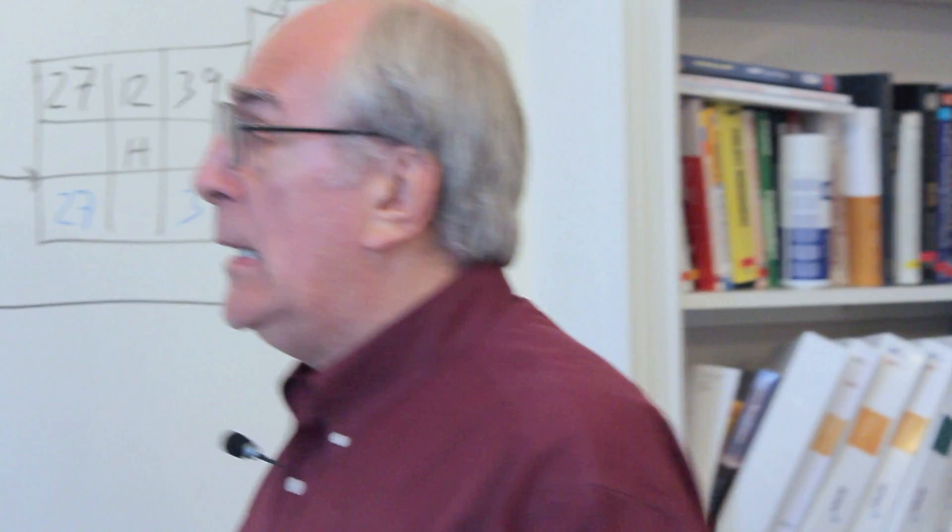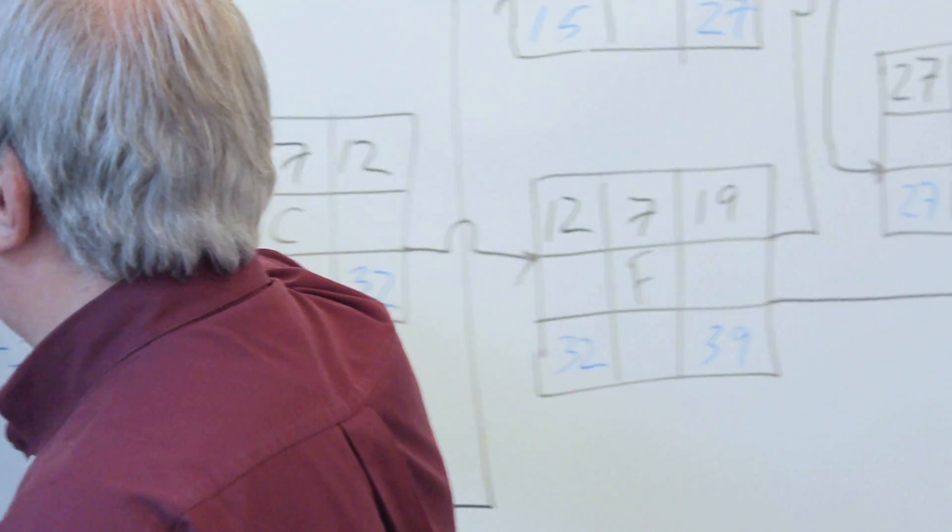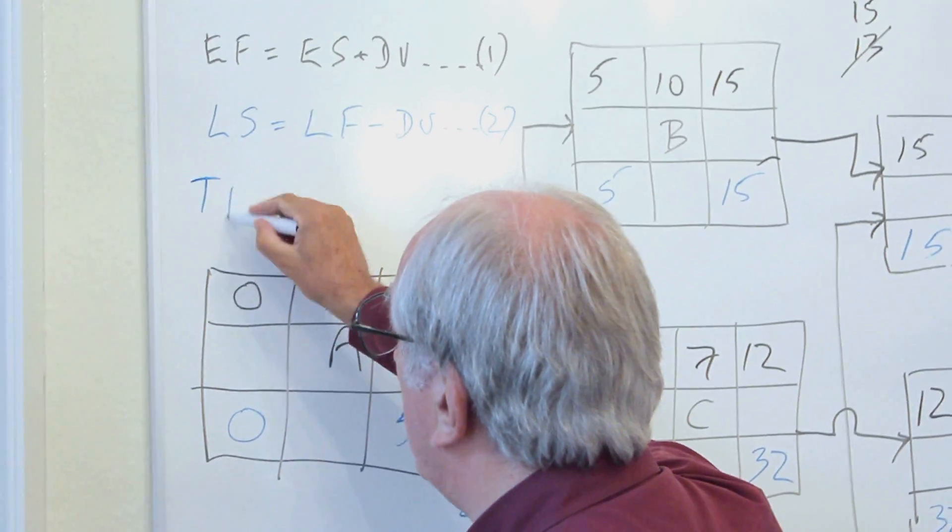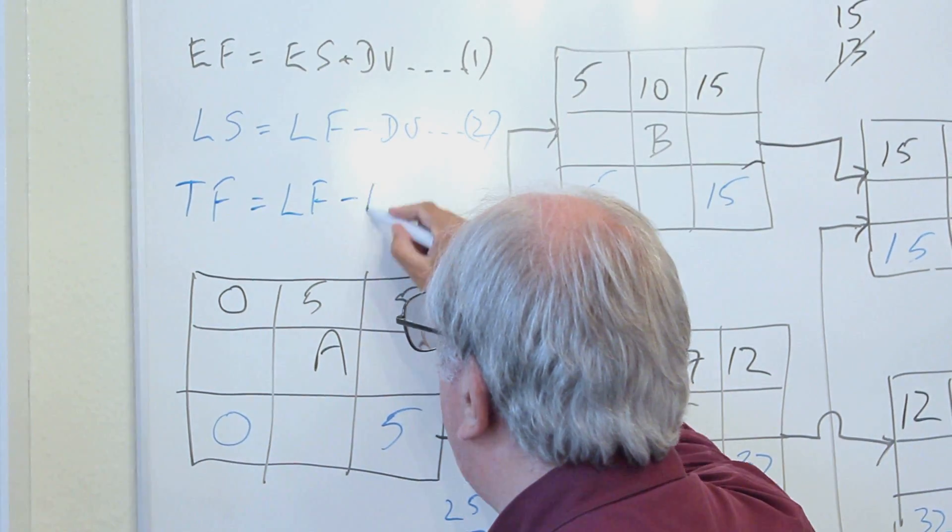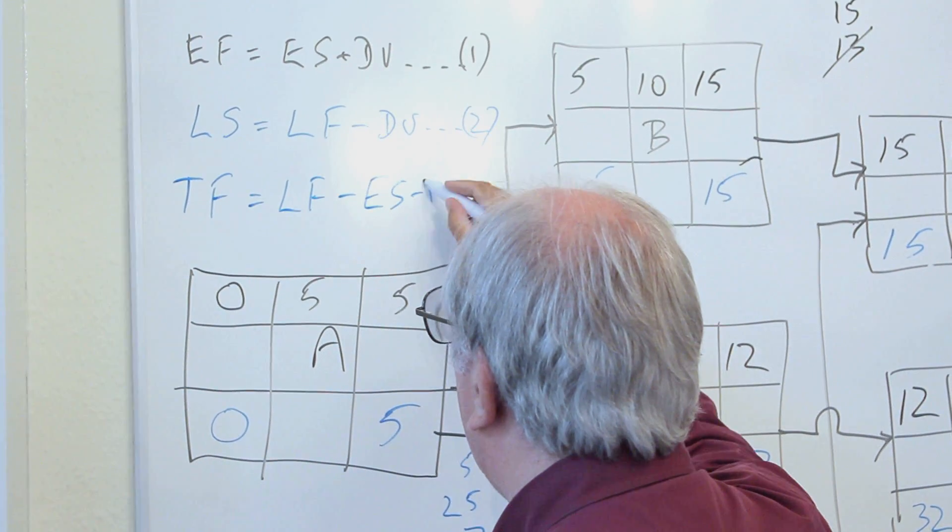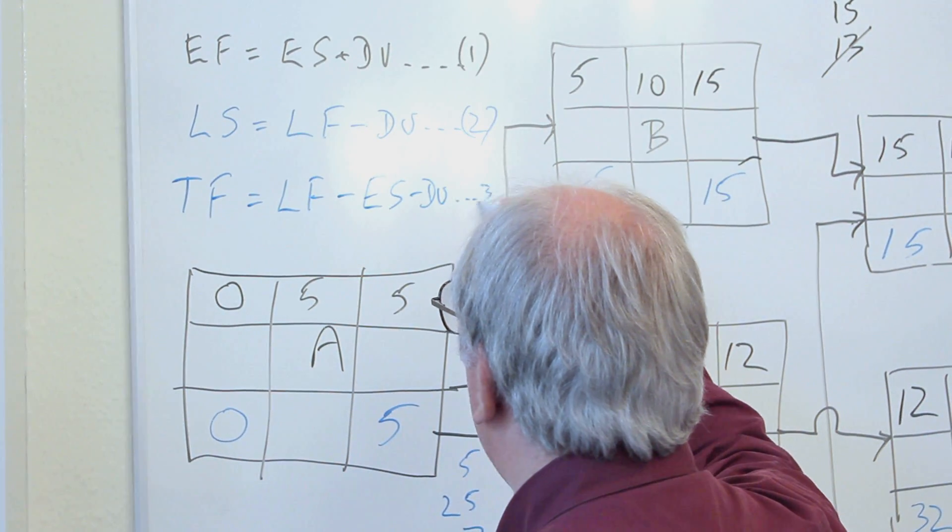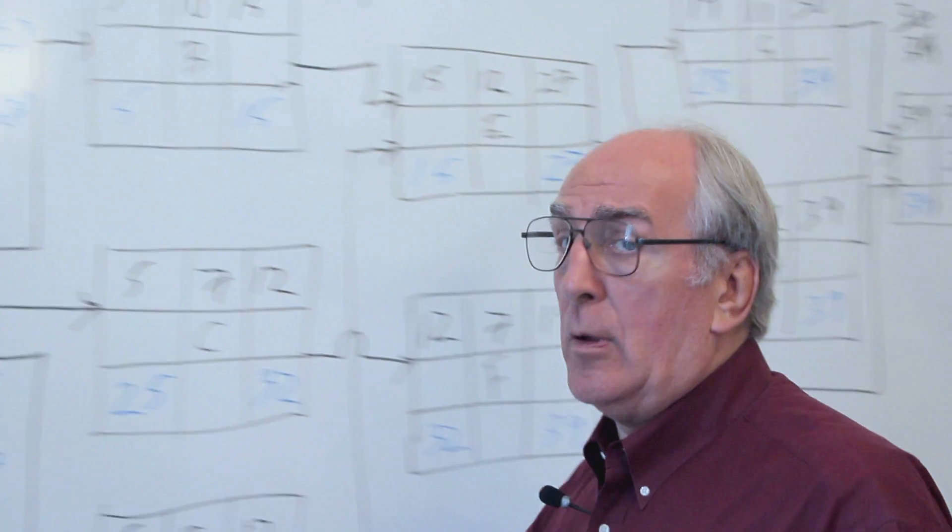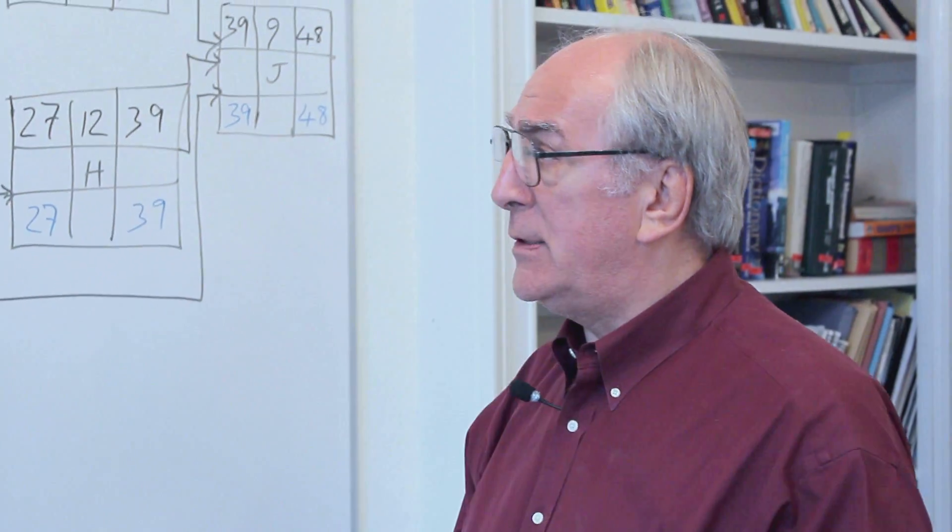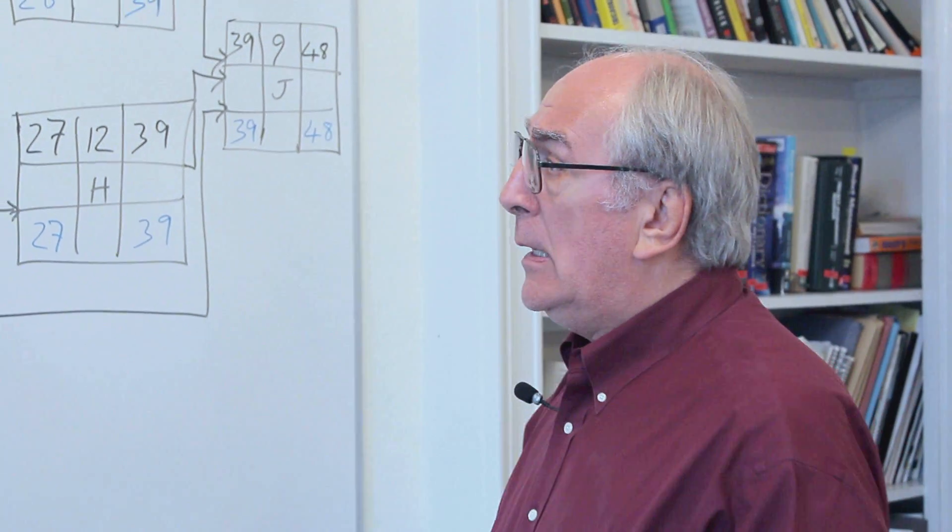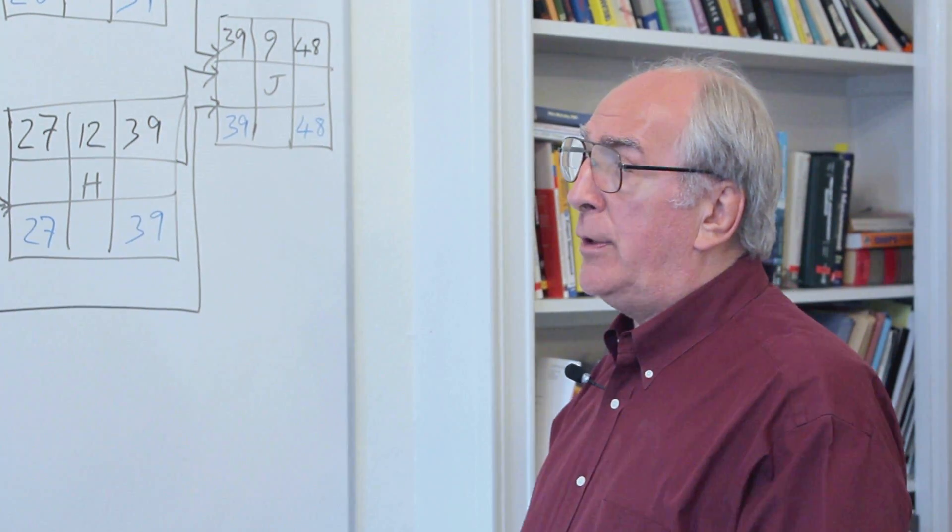And the equation that does that for looking at what is known as the total float looks like this: you take the total float on activity A, late finish minus the early start. We'll call it DF and that equals the late finish minus the early start minus the duration. And there's our equation three that works all the time, that works all the time for all the different types of conditions that you can get.